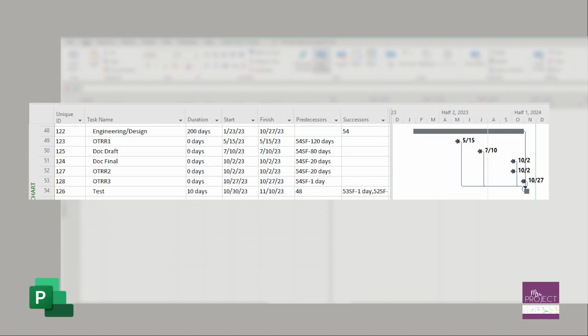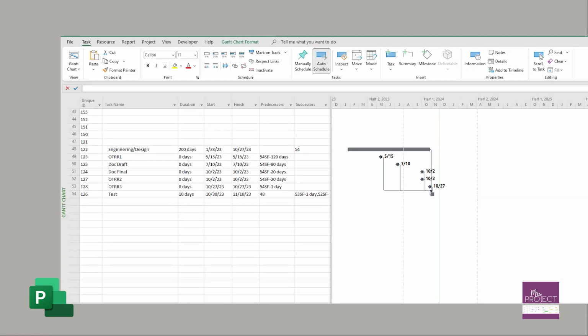And so if you backwards plan to say, okay, before this test happens, 120 days beforehand, we have to have this test readiness review. Well, you're going to use a lead to figure out what the target date is, but you need to actually put in there with that engineering and design, put the checkpoints in there. Break that task out even more and put it where those TRRs and those test reviews can be driven by the engineering and design, not by the calendar days. You can use this lead to figure out what your target dates are and set those as deadlines, but you really need to do the forward planning and not the negative lead part of it.